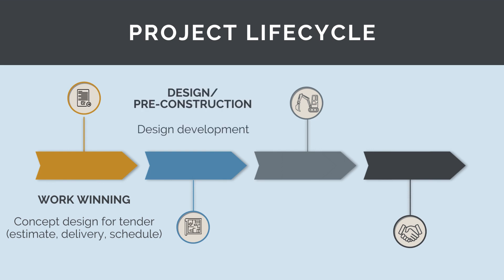Once the contract is awarded, the contractor will then need to manage and coordinate the development of the detailed design through the different design gates. The final design gate will be the issue for construction stage. With issue for construction drawings ready, the contractor can proceed with the construction works.